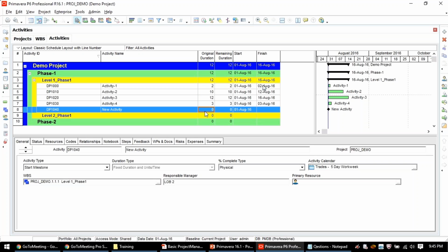I have selected this as project start. I have started my project, but can you see here my activity number has messed up. Instead of adding first, I have added in between. So now it's my responsibility to change the coding. How can I change the coding? There is no way to move it. For example, I am adding 990, but still it is not moving to the top. The only way is I can change the first activity to 1005 and this one to 1000, so that it will be in order 1000, 1005, 10, 20, 30.